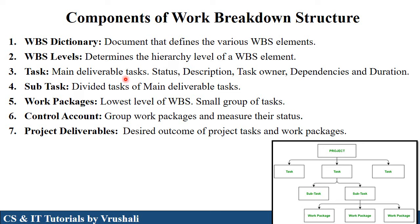The next component is a task, meaning main tasks or main modules. Subtasks are those main tasks divided into different subtasks. Then work packages — work packages are placed at the lowest level of WBS and represent a small group of tasks which indicate the status of your complete project. The next one is a control account, which is a group of work packages. It measures the status — what type of task has been performed and how much time is required to complete a particular task, showing the status of your project module by module. The last component is project deliverable — after completing the project, the desired outcome is mentioned in one task, which is delivered to the customer.